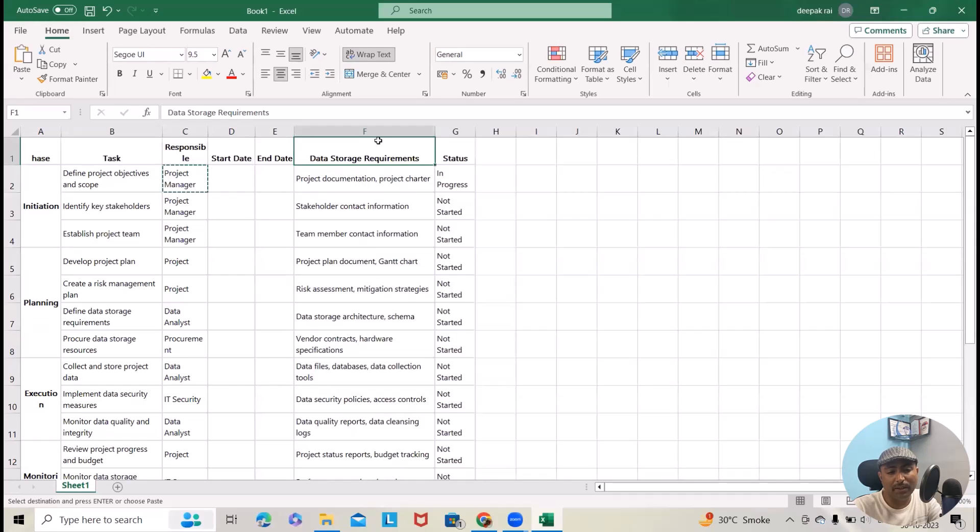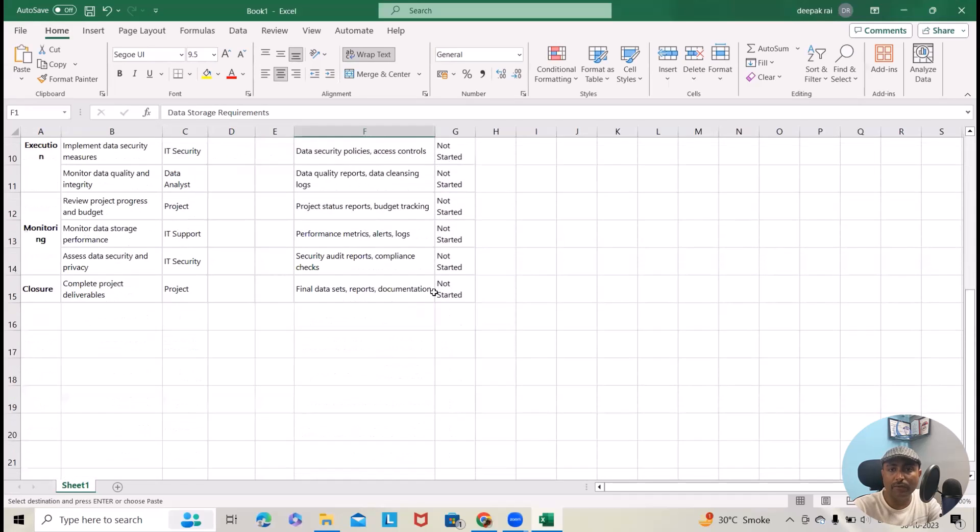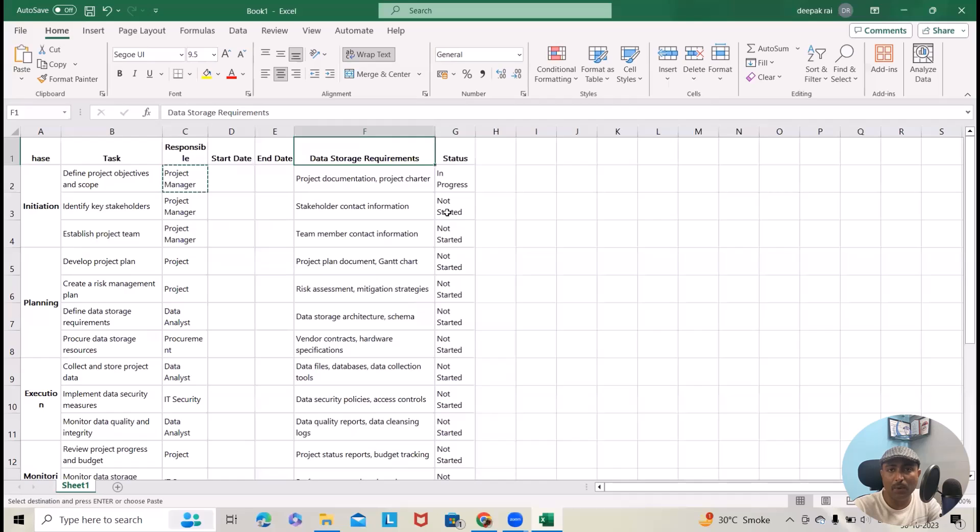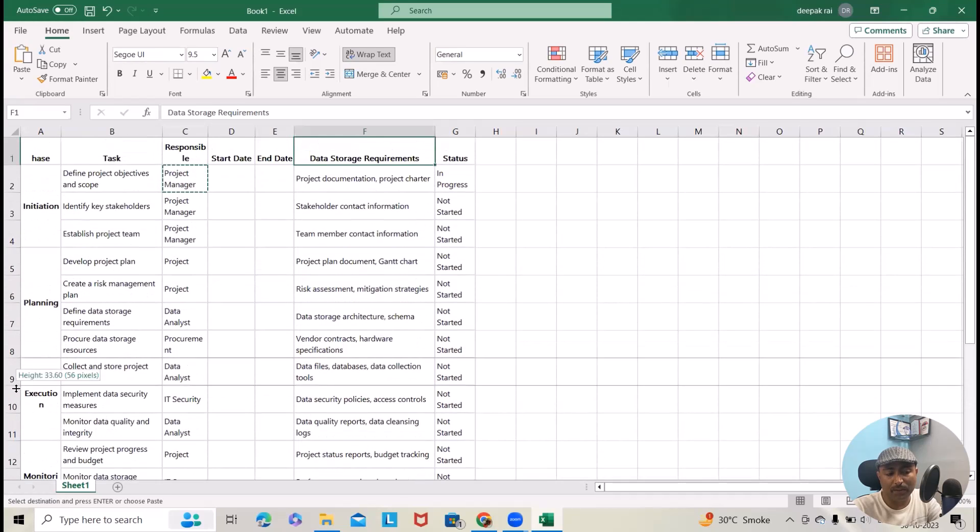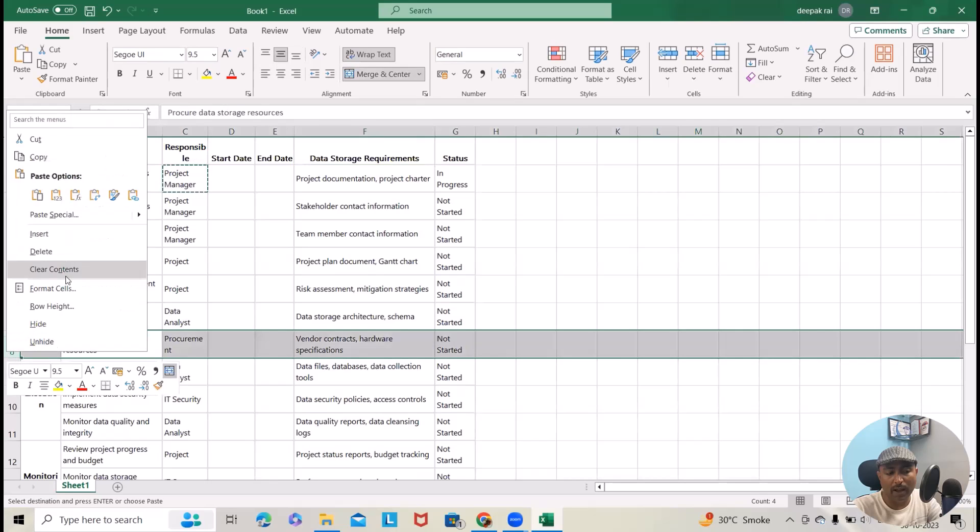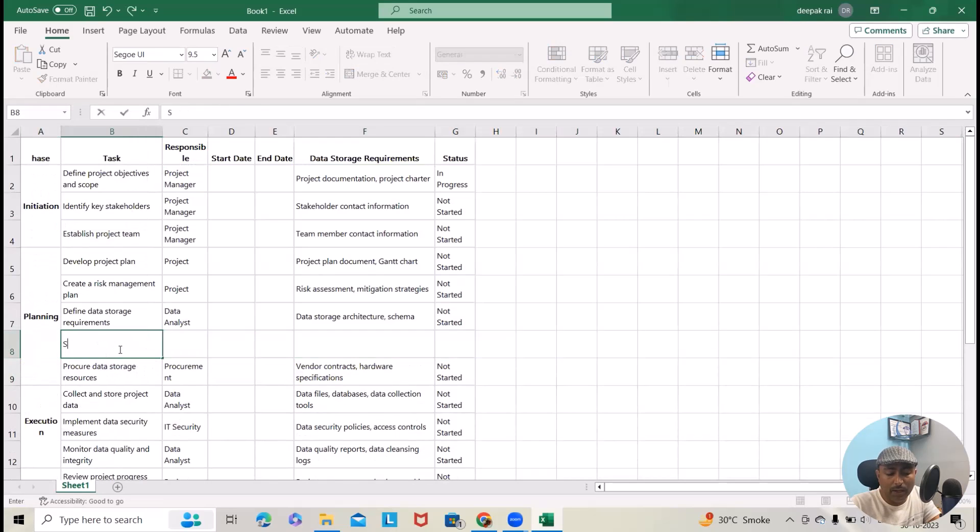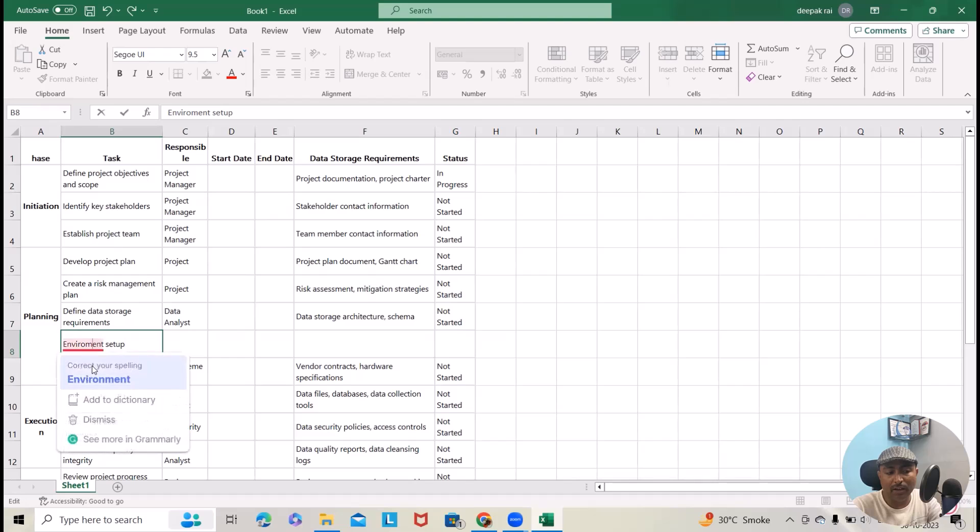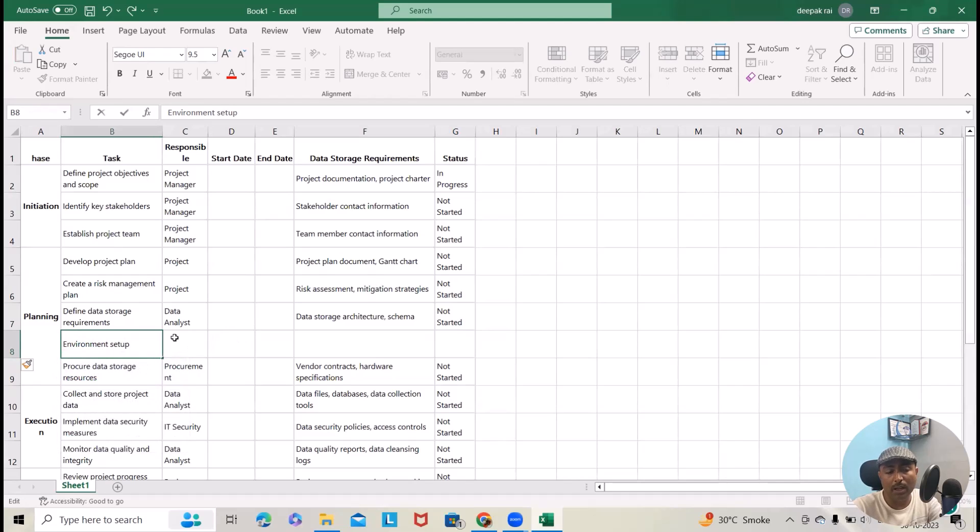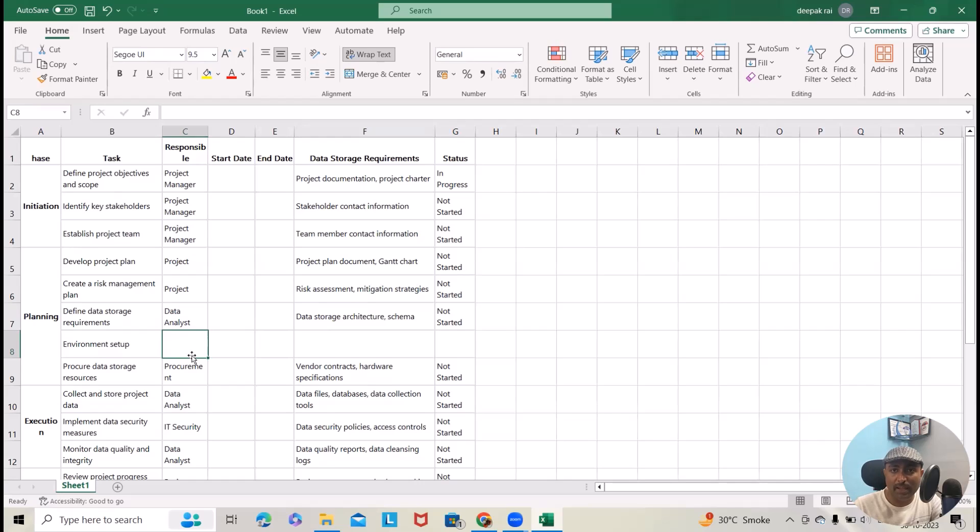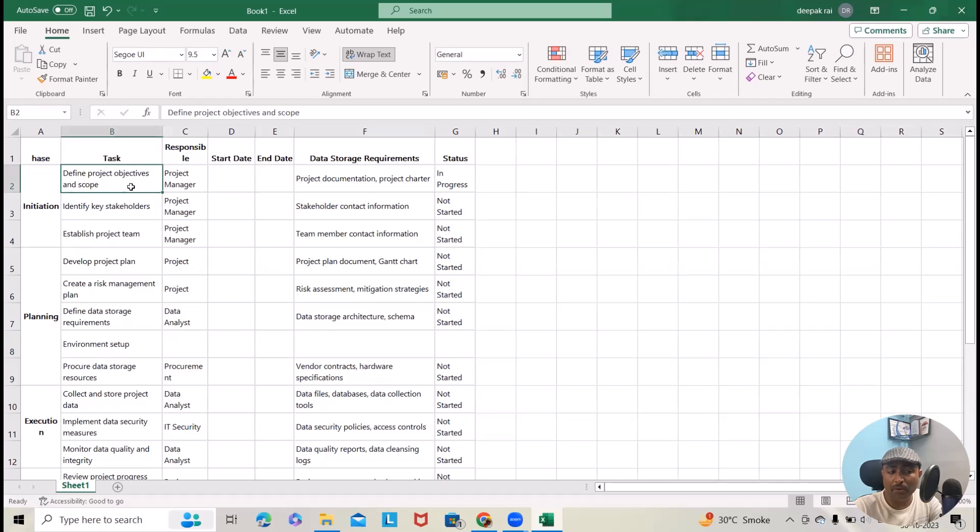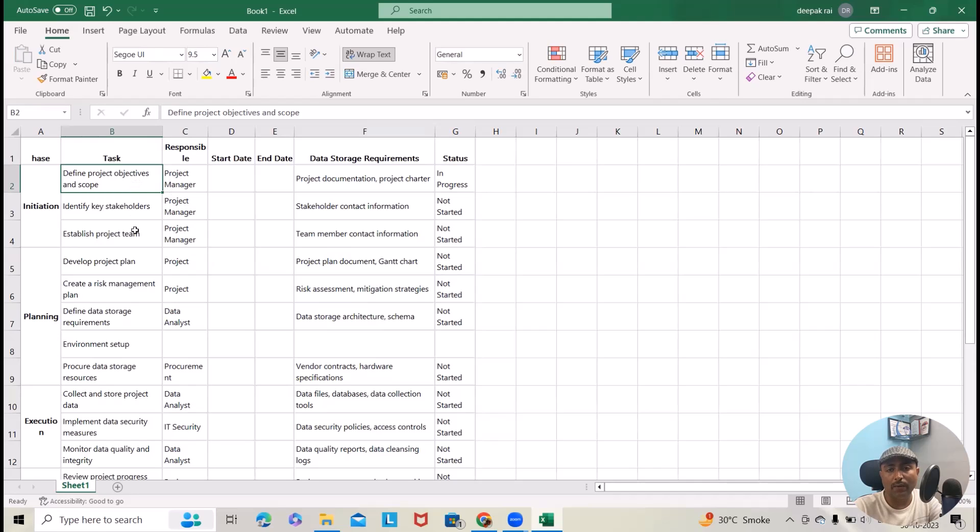Data storage requirement—if you want, we can remove it or add status where we are lying. We can keep all those statuses. Within this planning, we also want the environment. If I want to add some environment-related stuff, I will include just environment setup. This will not have the environment setup only for the UAT or only for the development—environment setup for every user. It means developer, pre-productions, and finally the production environment. These requirements will be taken care by the IT team and IT team manager has to respond by when they will be able to finish it. Let's start with the defined project objective where team has to create the complete project objective and scope what we are going to build. With the help of business analyst and project manager, we will be able to finish the scope after walkthrough and understanding sessions from the end user.